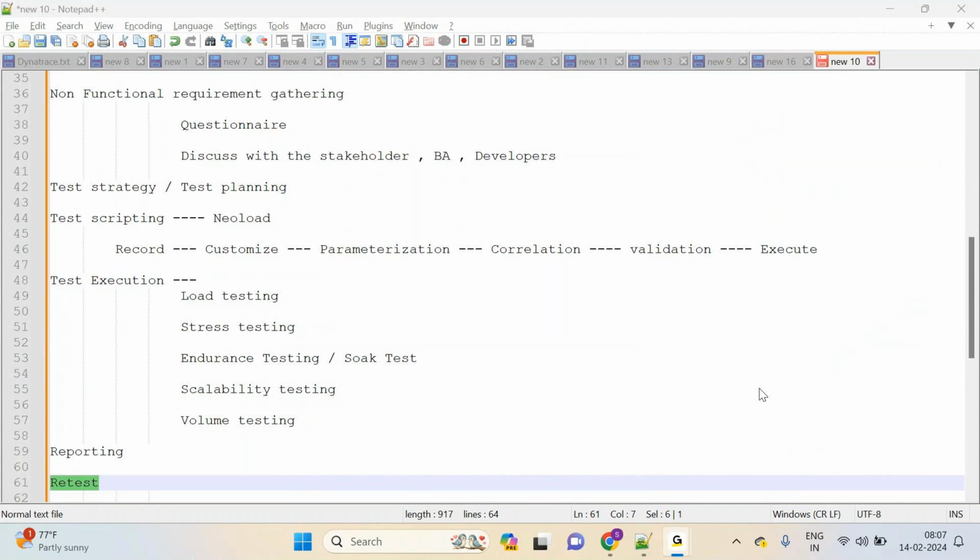Like that, whatever things are not in your scope, you need to call them out separately, so that the customer will understand: these guys are only coming for performance testing, they are not going to fix anything, optimize anything, or prepare any test data. They are not going to do any activity other than performance testing. Like that you need to call it out. Clear?